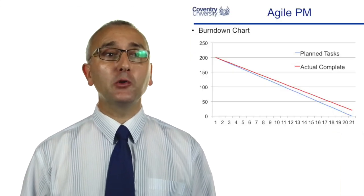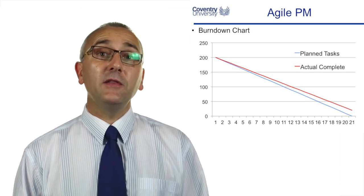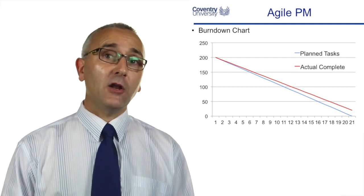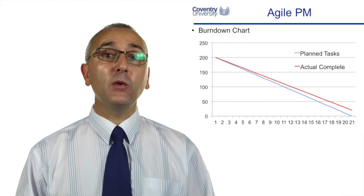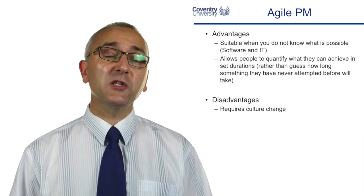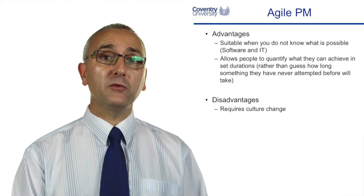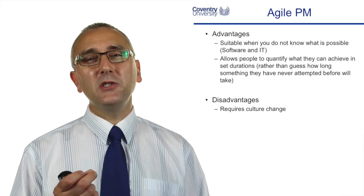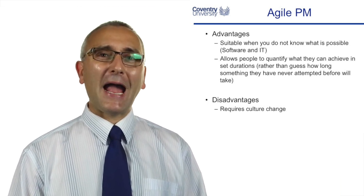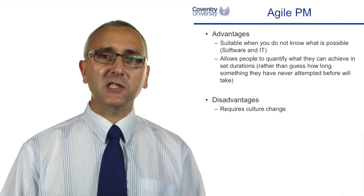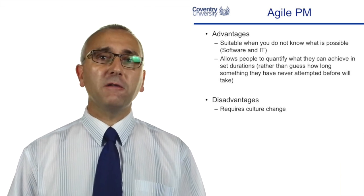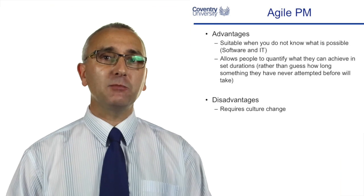A second agile tool is the burndown chart — a graph that shows how many tasks you wanted to complete and, over the life of the project, how many you've actually completed as you burn down towards that target. Agile project management has a lot of support in the textbooks, more so than critical chain project management. It's very suitable when you don't know durations or how you'll achieve something, which applies to software and IT-type projects. It also has tools that allow people to quantify what they can achieve in a fixed period of time.